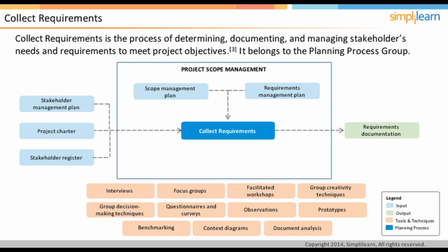Requirements documentation is one of the most important outputs. The second output of this process is the Requirements Traceability Matrix. This table helps trace whether the work has happened on the requirements, whether all requirements are reflected in the final product of the project, etc.